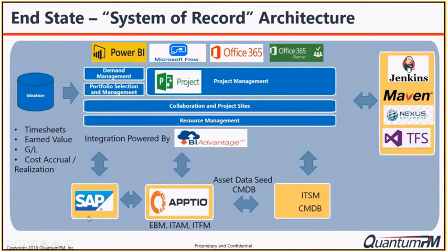Here's an example of one through SAP, which is an ERP package, which is financial management. You might have a situation where every time a project's created, there could be an approval process, then budget's allocated, and that needs to be tracked. So the approval needs to be sent from Project Online to SAP to set up a general ledger account for this particular expense and keep the CapEx and OpEx piece of it. And you can track CapEx and OpEx within Project Online.